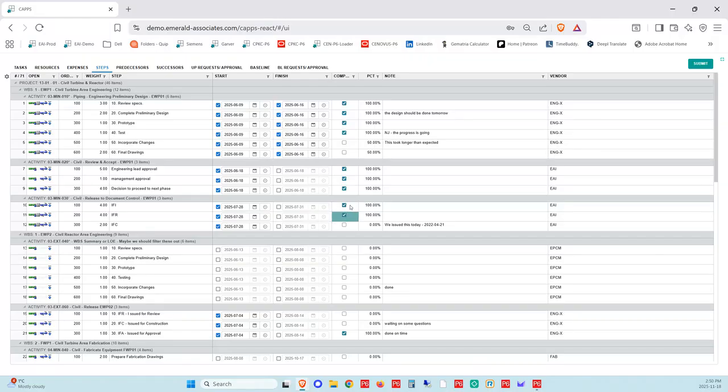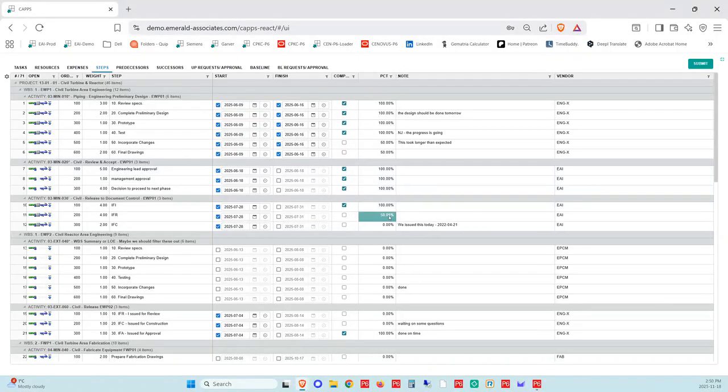Now, if I've got both of these fully done, it's going to be 80, but if this one is only partially done, so let's say 50, oops, I should make that a little bit bigger. Okay, so then it's going to be 60 if my math is right. Now again, I can put a note in here. Should be done. Okay, so this allows me to do very, very quick updating in the steps alone.